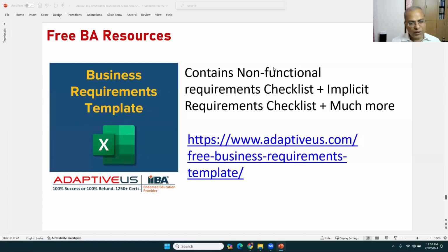Chuang has one good question. As a business analyst, it's important in agile projects to prioritize requirements very well and work on the requirements which are in the near implementation cycle. Secondly, in agile projects, I would request you to put a bit more emphasis on non-functional requirements in the beginning. After the non-functional requirements are defined well, the architect designs the solution to cater to them. Functional requirements can be done quite well in an iterative manner.